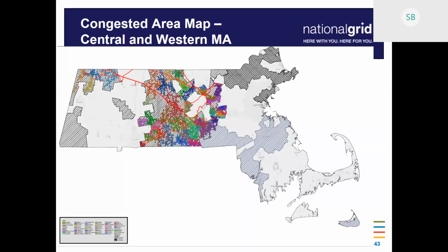That's where we came up with our solutions of rebuilding subs, adding new transmission interconnection points, adding new transformers, and adding new substations altogether. Once distribution came up with what we would like to accommodate the area, we coordinate with transmission, and that's where the transmission study is happening now, which is being required by ISO and NEP right now. So hope that answers it.